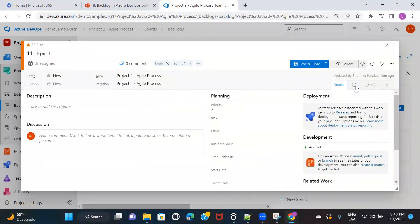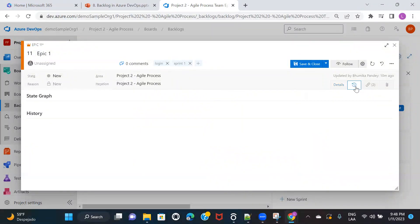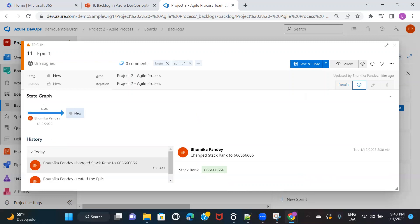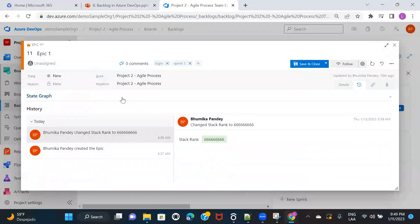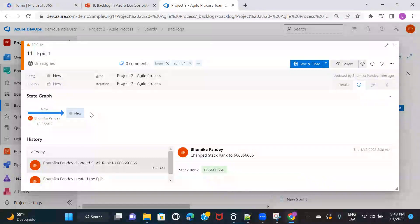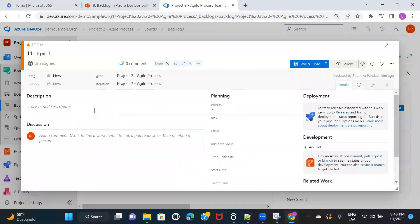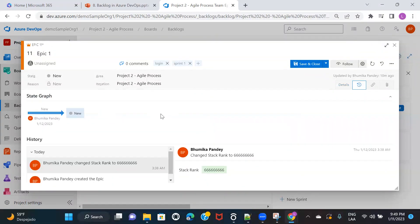On the right side there's a History tab. You can see I created this epic and moved it to New state. If I change the status from New to Active, it will also start showing that history — what change happened and on which date. Anything that is changed is going to be tracked under this History tab.